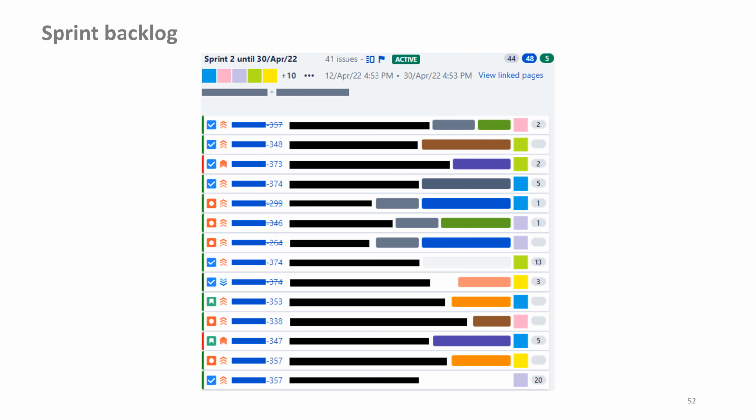The sprint backlog is similar to the product backlog, but it is a subset of the product backlog that is determined by the team. The team decides how much goes into the sprint backlog, and it belongs to the team. It is what the team believes they can deliver.